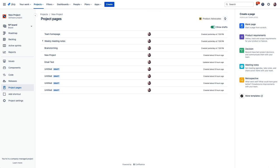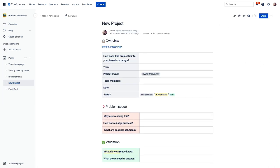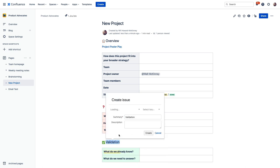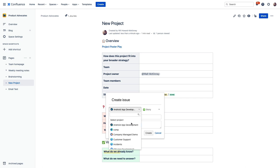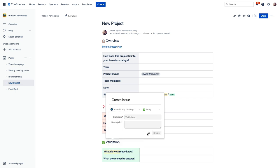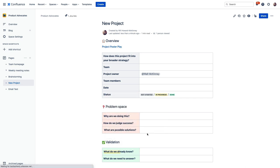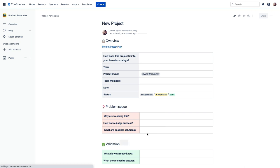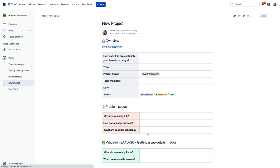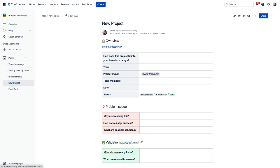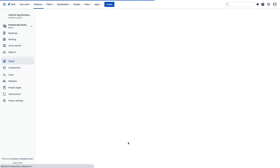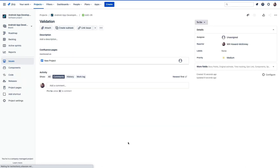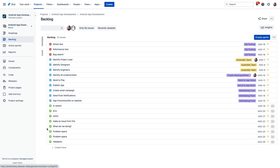One more really useful integration between these two is you can create Jira issues directly from Confluence. And once a work item is ready for action, you can highlight it in Confluence and click on create a Jira issue and create it directly into the right project where it will appear in that project's backlog. Now the corresponding Jira issue will automatically appear in Confluence, so you can click directly into it. And if we look at our backlog, we can see that it's waiting right here for us. So when we're ready, we can add it to a sprint. Project planning and project delivery both in a single platform to help simultaneously speed up and simplify your work.